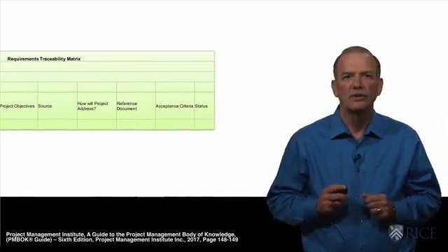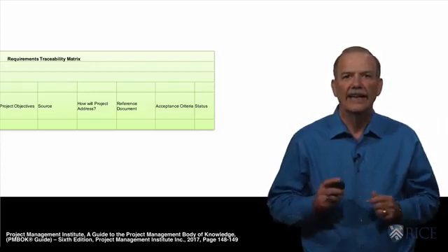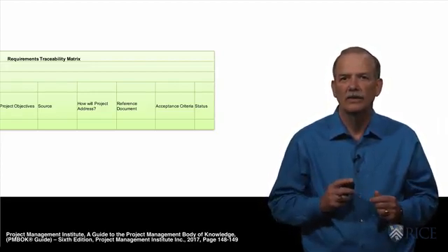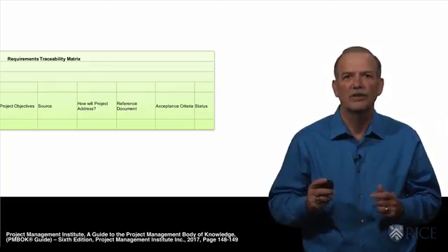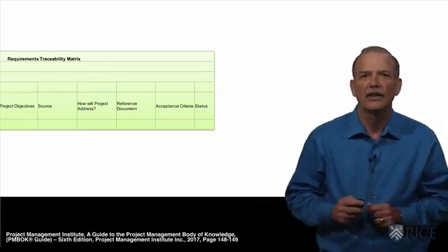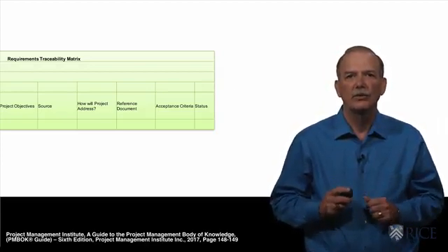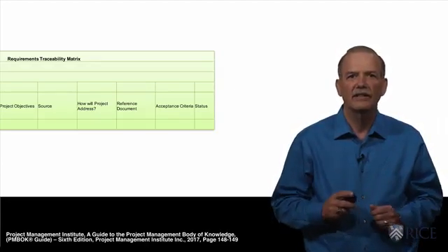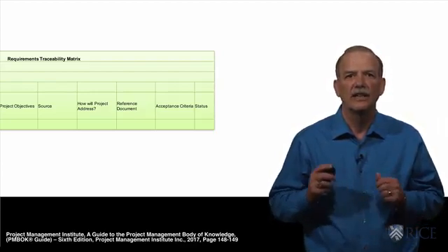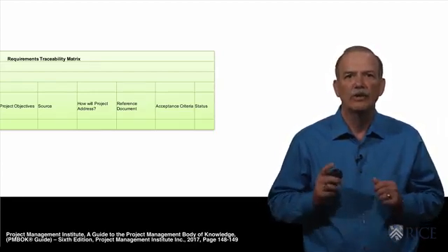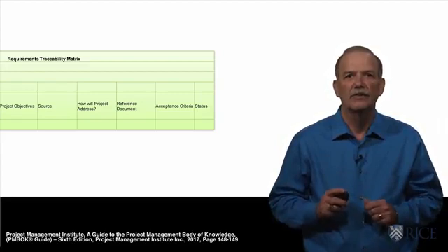As part of the project scope development process, we incorporate these requirements into the scope statement and add any services that are required to implement the requirements. Then as a last step, we present the completed project scope statement to the project sponsor and any other approving authority for final review, comment, and approval. The approved project scope statement becomes our agreement on the products and services we will deliver as part of the project. It also includes the agreed acceptance criteria that outline how we will know that we've met the requirements. This becomes a key document to define our project.